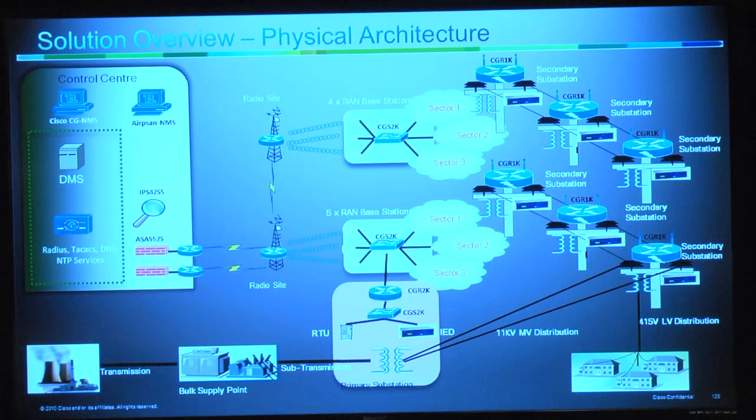If those of you are asking who was the WiMAX provider, no, it was not Cisco, it was Airspan. Cisco does not provide WiMAX-based radio solutions, so we had collaborated with Airspan as the WiMAX solution provider. What Airspan were responsible for was providing the WiMAX radio cells and for providing the WiMAX radio plan. What Cisco was responsible for is ensuring that the WiMAX infrastructure ran an IP infrastructure and the quality of service and security necessary to run the end-to-end solution. So you can think of Cisco as running the overlay and the entire solution architecture, and the subcomponent of WiMAX radio was taken on board by Airspan.